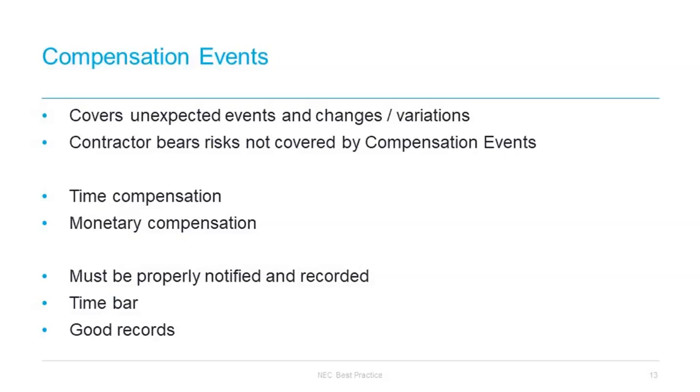If a compensation event reduces the total defined cost for the works, then the prices can be reduced, but this is in limited circumstances only. As we noted previously, accurate assessment of compensation events can only happen if the contract data is complete with respect to the shorter schedule or schedule of cost components.